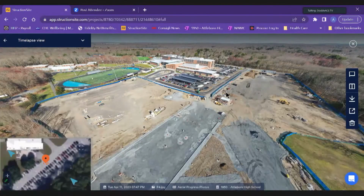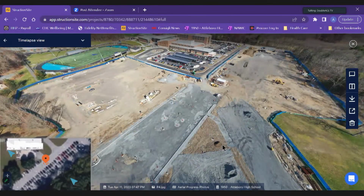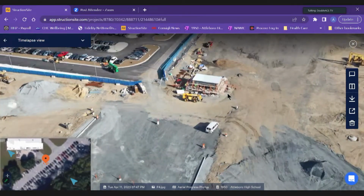All right. Are you up, Ally? I'm ready. As you can see, NCI has continued bringing in fill and taking out some spots, continuing grading for the athletic fields. Keep your voice up, some of the old people up here can't hear. They have been adding in some curb for the south parking lots down here. On the L building, the masonry has been completed, the roof was added, MEP connections continue to be installed, and connections into the irrigation system have begun.